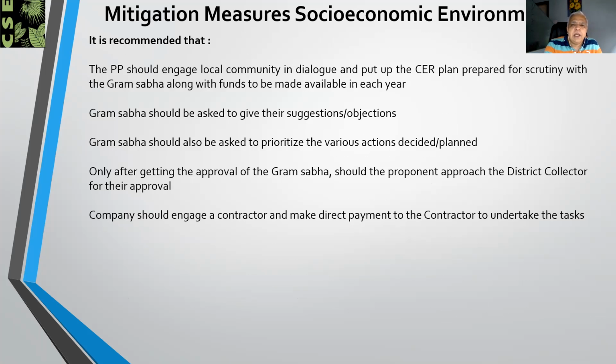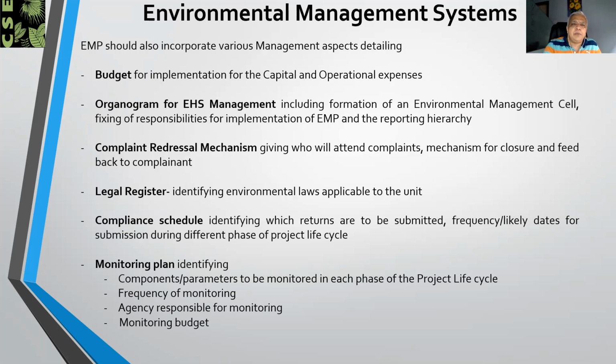And the other thing which we recommend is that the company should engage a contractor and make direct payment to the contractor to ensure that the tasks which are identified are completed. The money should not be given to the local gram panchayat, because then it will ensure that the project gets completed.